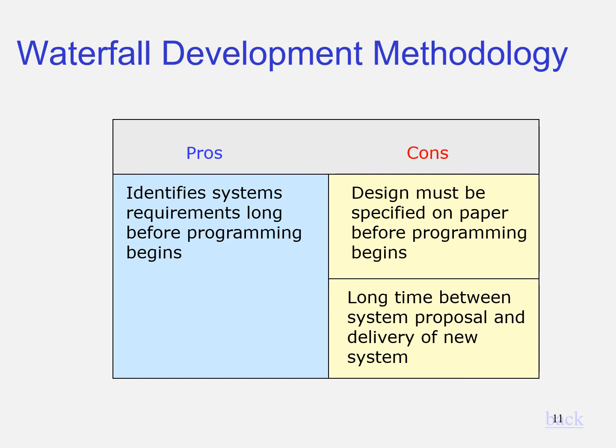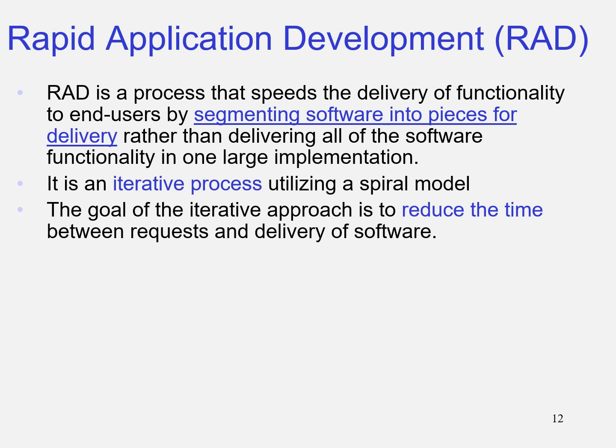So that is what the waterfall development methodology is referring to. It seems that kind of method is not very flexible, right? Because what happens if the system analyst, when meeting the user, understood the system differently from what the user wants? The user would not know that, and will wait until the system is ready. Then when the system is ready, it is shown to the system analyst and to the user, and they do not agree with the design or the system. So what will happen? It will be such a waste.